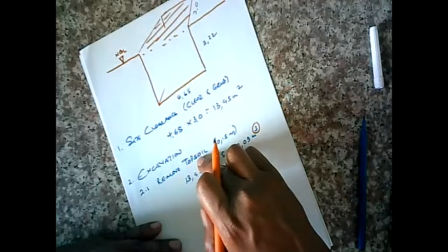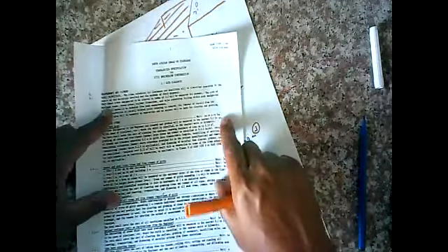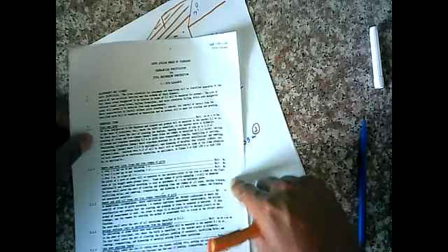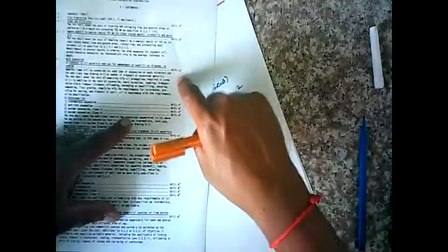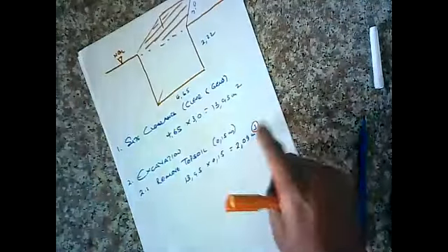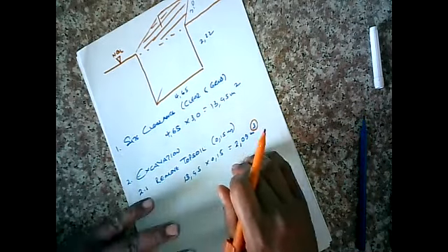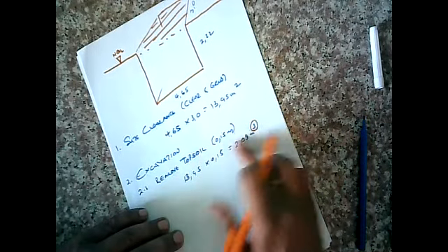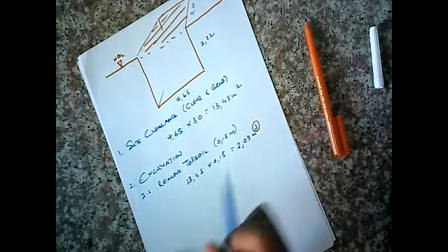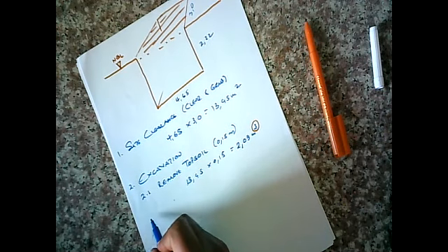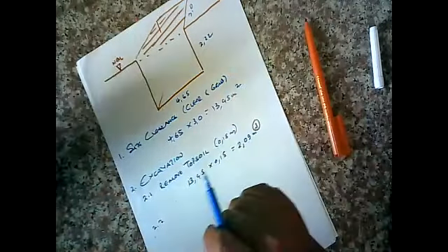Therefore, when it comes to topsoil removal, even though SANS 1200 speaks of it in square meters, somewhere, I'm actually extracting it in terms of cubic meters. All right, so for now, commit to memory the fact that when we remove topsoil, we're removing a volume. All right, after that, what do we do? 2.2. Remove the topsoil, we actually now start digging.